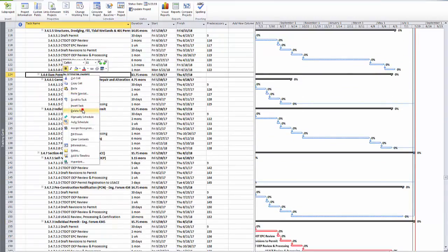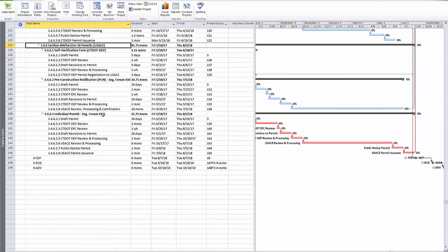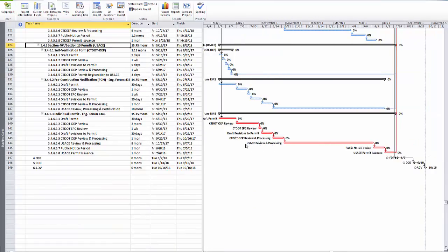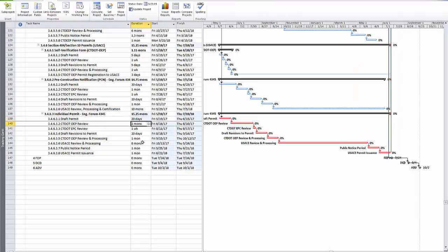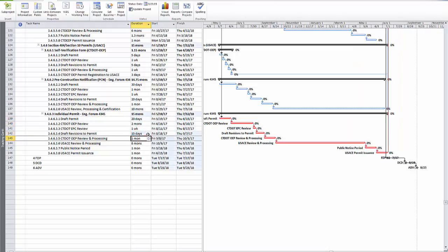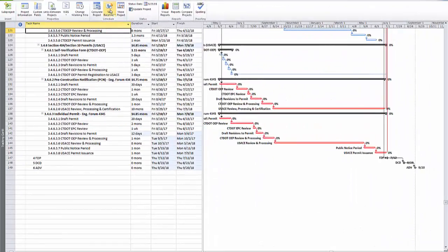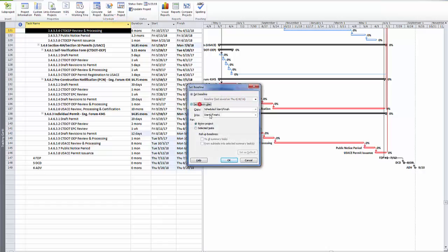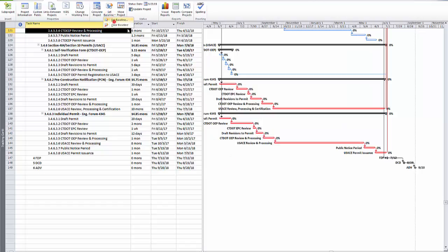Now, to still make my current FDP date, I still need to shave off some time on my critical path. To do this, I go into my schedule and I reduce the duration for the tasks that I'm responsible for executing until I reach my baseline FDP. And now that I have backed into my current FDP, I'm going to re-baseline to capture the updated schedule. To do that, first I save my current baseline. Then I set my new baseline.